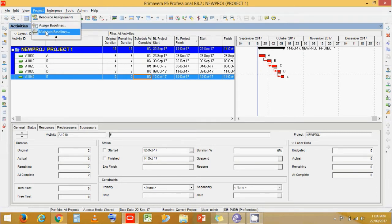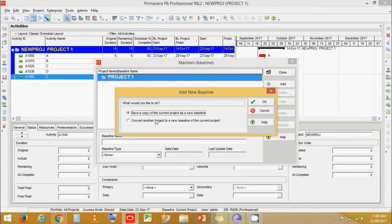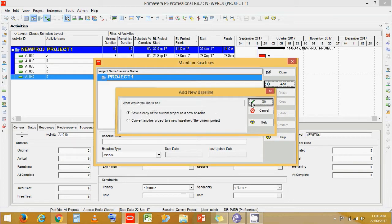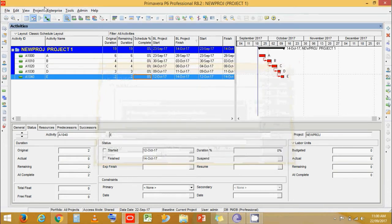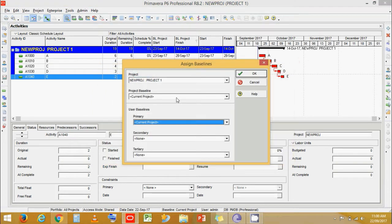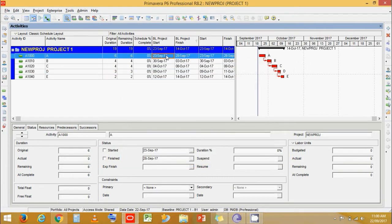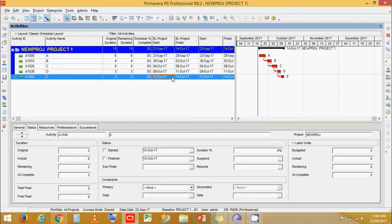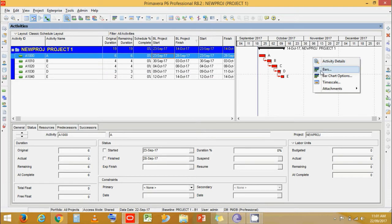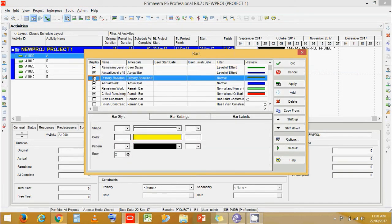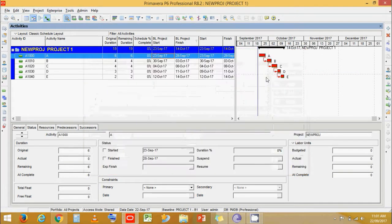Go to Project, then Maintain Baseline. Save the current copy of the project as a baseline. Then go to Project, Assign Baseline, and assign it as the primary baseline. Currently we cannot see the baseline — let's go to our charts, click on Primary Baseline, and now we can see our baseline.